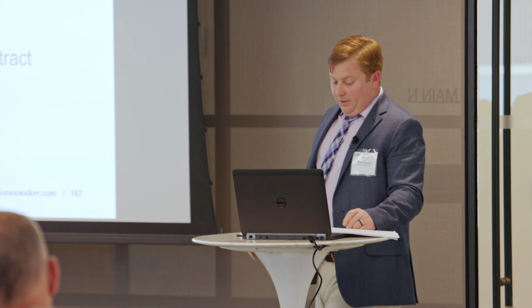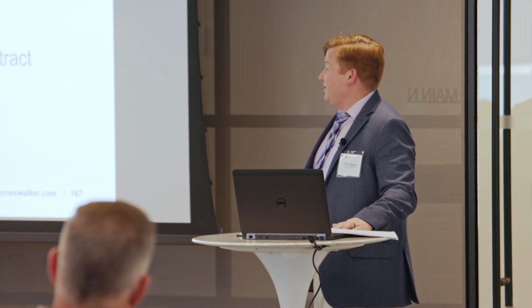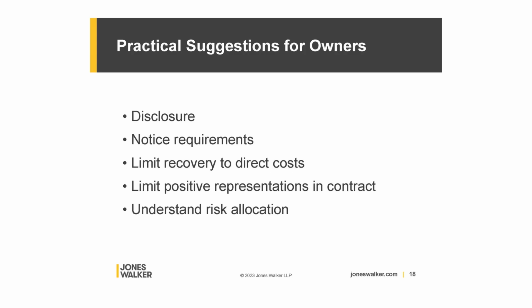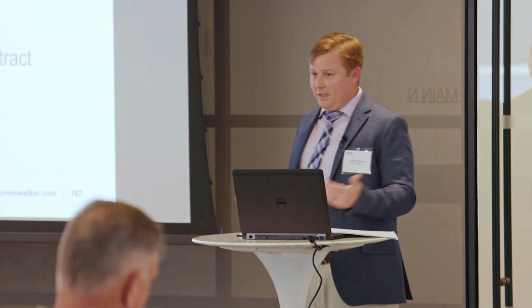So you're struggling with the risk of different site conditions. So here I'm gonna cover some practical suggestions for owners. First, disclose all known conditions prior to submission of the bid. It's consistent with this goal that you want accurate pricing in the first place. You want the contractor to price contingencies that you're aware of. Second, you are creating a superior knowledge claim if you know something that you're not disclosing.